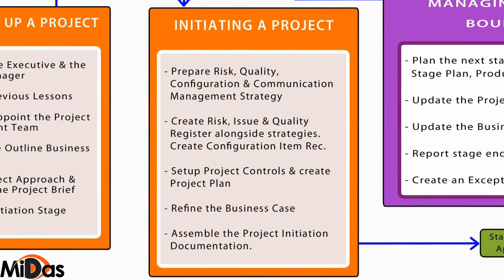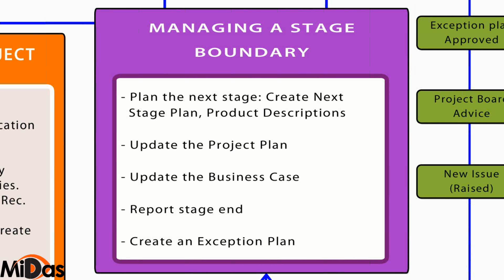Now, you would argue, we already have a project plan. But let me ask you, if you stand on the road, you can only see to an extent. Probably you can see, at max, 1 kilometer ahead, what lies ahead of you, but you cannot see beyond that. There's a horizon to which you can see. Similarly, in planning, there is something called a planning horizon. You don't want to plan something in one go and go wrong everywhere. So let's have assumptions overall, and let's break it down into smaller plans. We call it a stage plan.